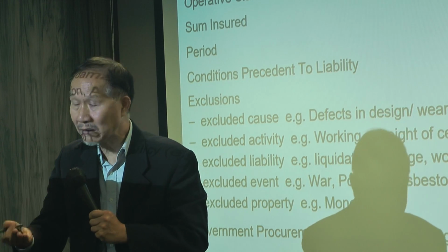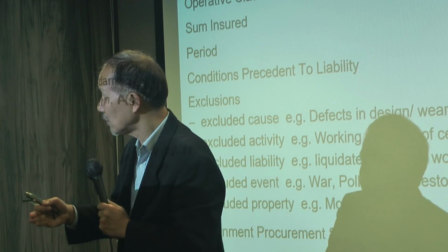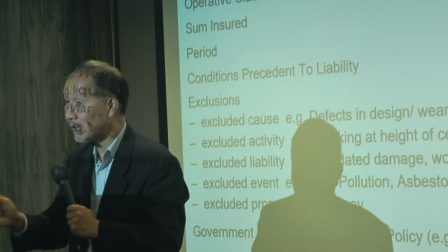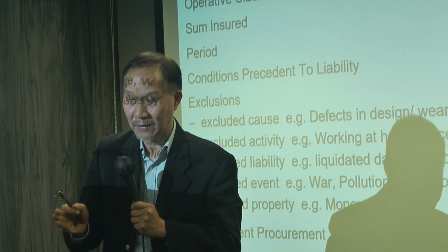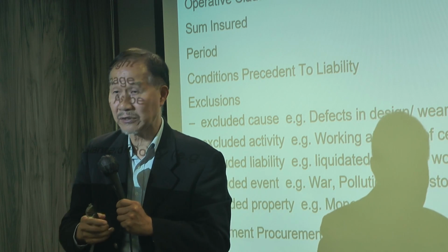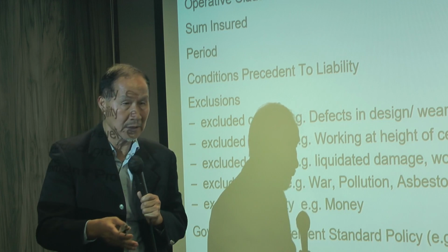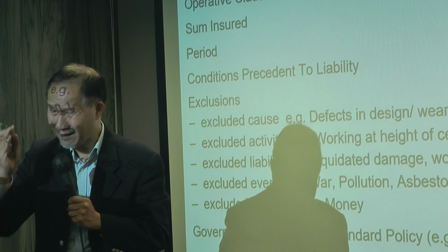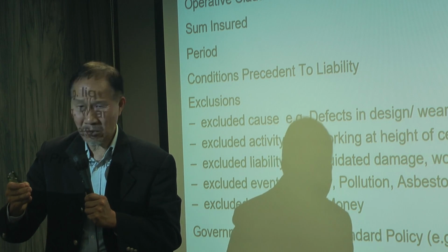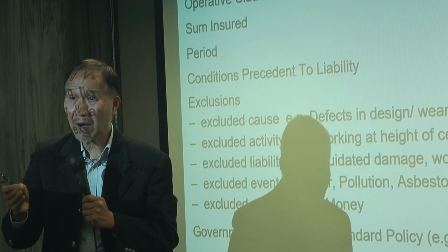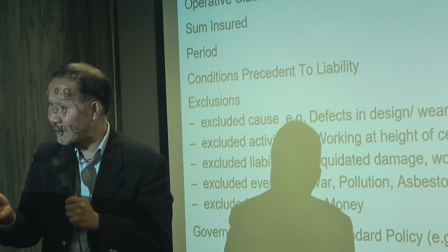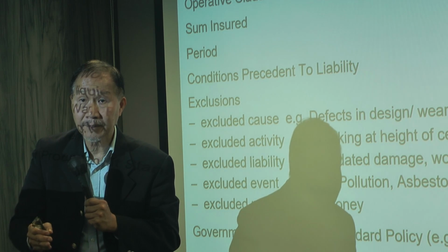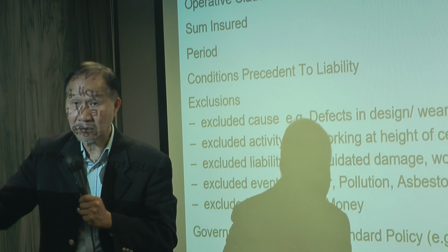Loss of trademark, loss of reputation, you suffer legal... This is not the subject. Theoretically, in the most cruel situation, if you take out a CL insurance, the limit of indemnity is 100 million, but you sustain a terrible loss, so many people are killed. Theoretically, the insurer's liability to you is to pay 100 million and walk away from you. So you are left there to handle the rest.